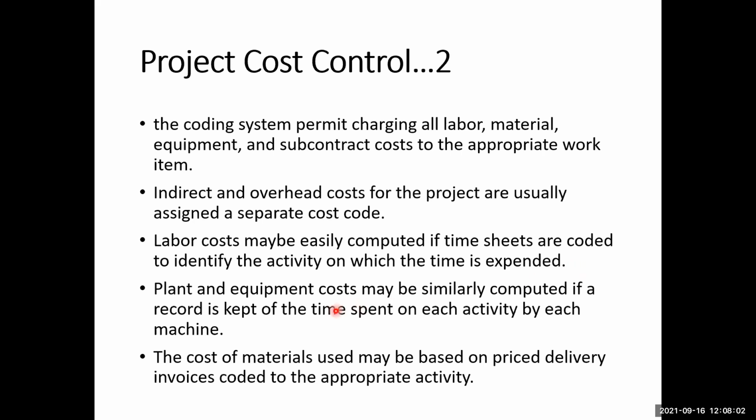And the same approach can be done for the plant and equipment costs, if a record is kept of time spent on each activity by each machine.